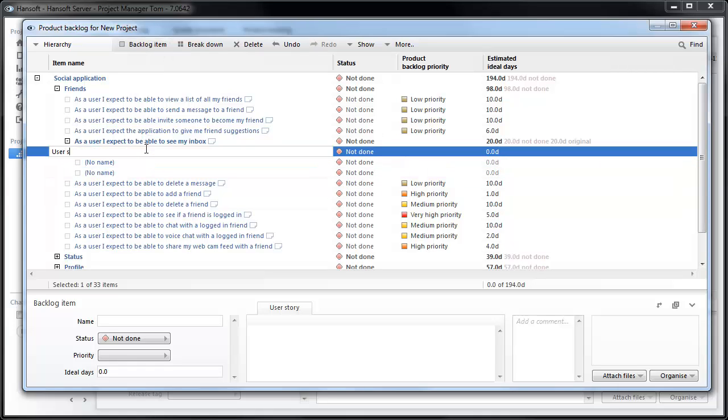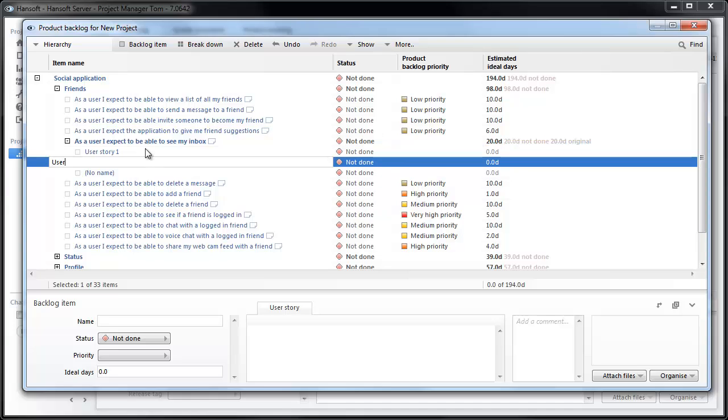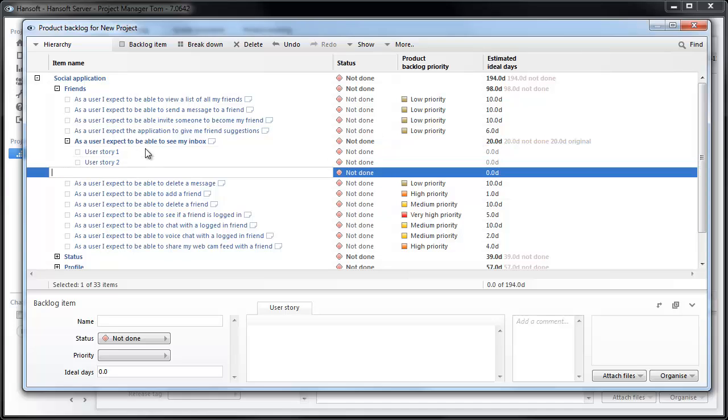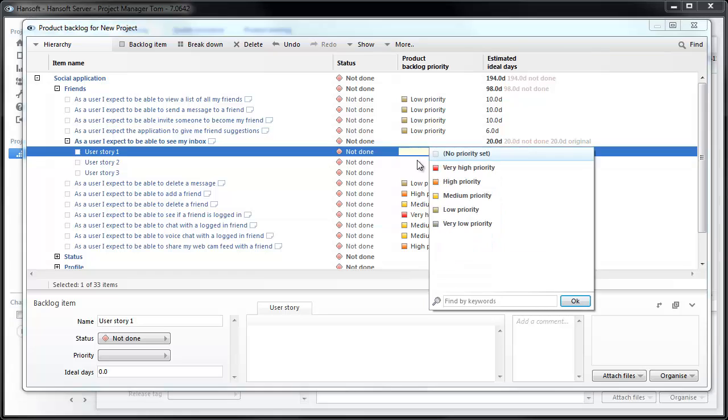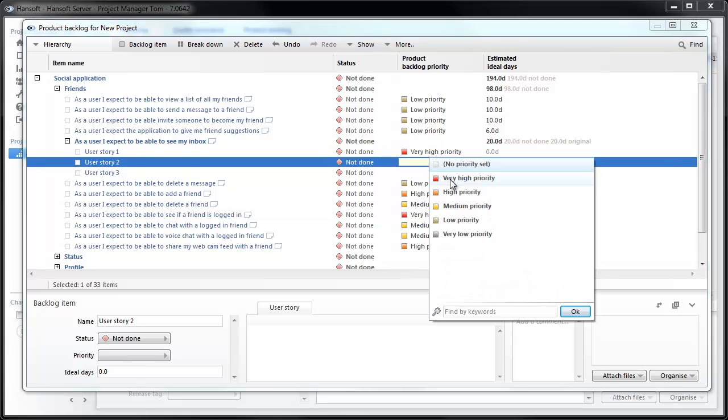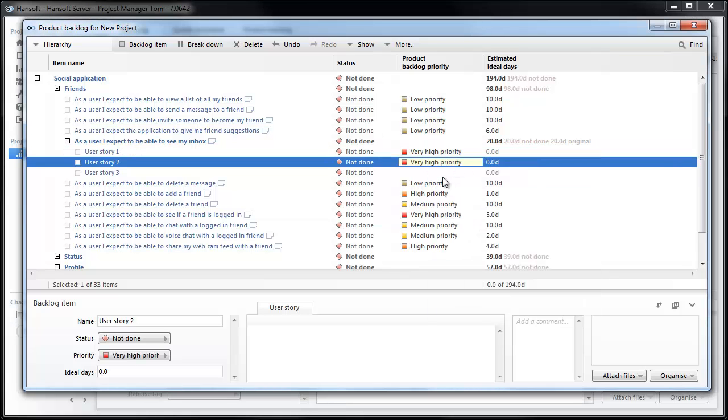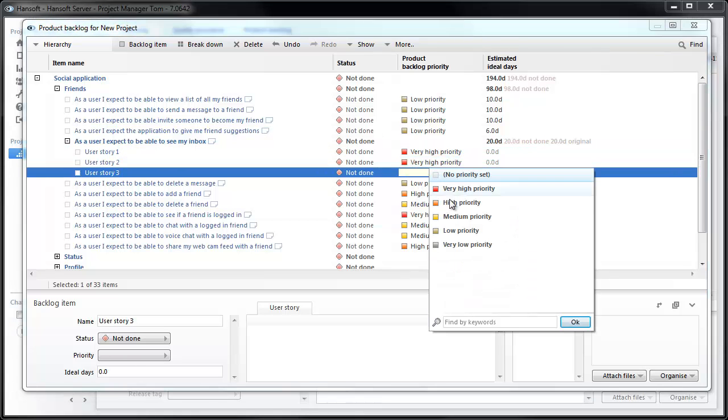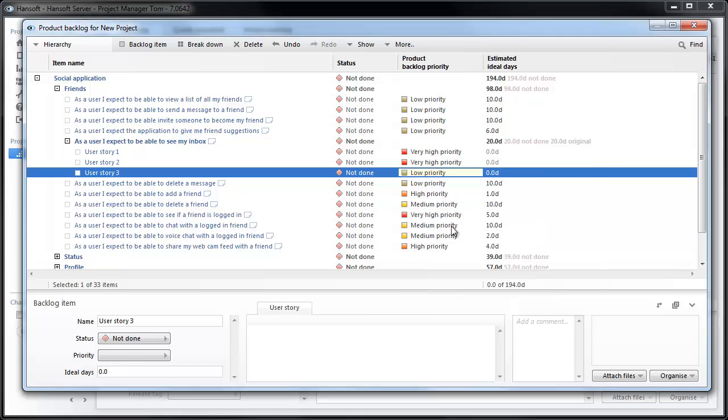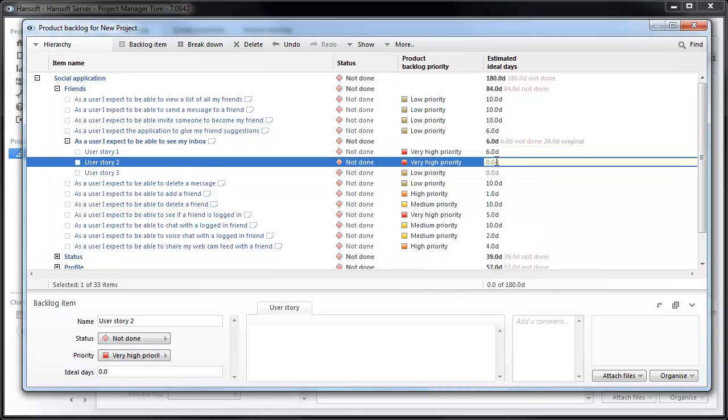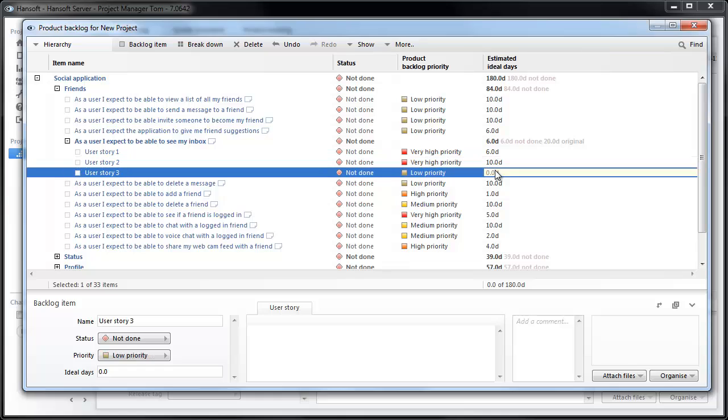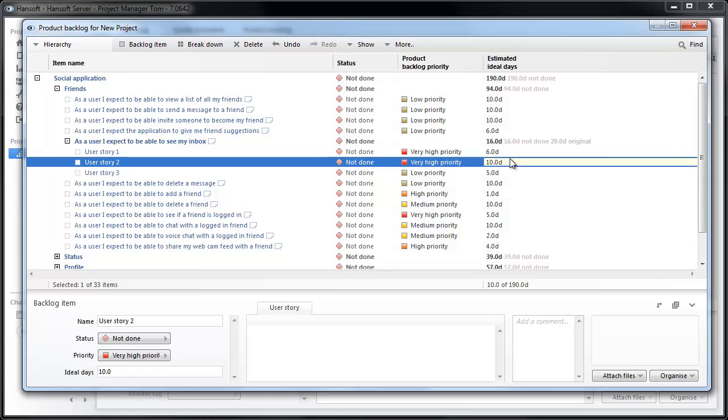I'm just going to call them user story one. Let's say that these first two are the ones that actually are very high priority, whereas this one can be done at a later stage. I'm going to add new estimates. And let's say that something like this. You can also see that the original estimate is retained at the parent item, but now our new estimates tell us that it was actually a little bit bigger than we estimated originally.